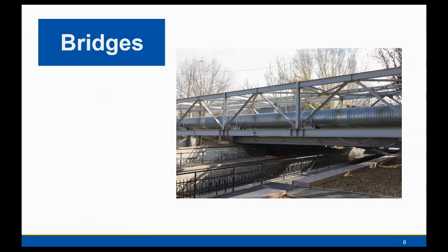Bridges inherently, I guess, are actually very difficult to inspect. If you just stop and think about some of the logistics of performing an inspection on a pipeline near a bridge, more often than not you're going to have traffic running right alongside that pipeline. In this one, we can't tell if it's a car bridge or a pedestrian bridge, but more than likely you're going to have to work with city or local governments to get permits to do this, schedule it far in advance, find a good time of year, and also it's going to be physically hard to reach and inspect these pipelines.